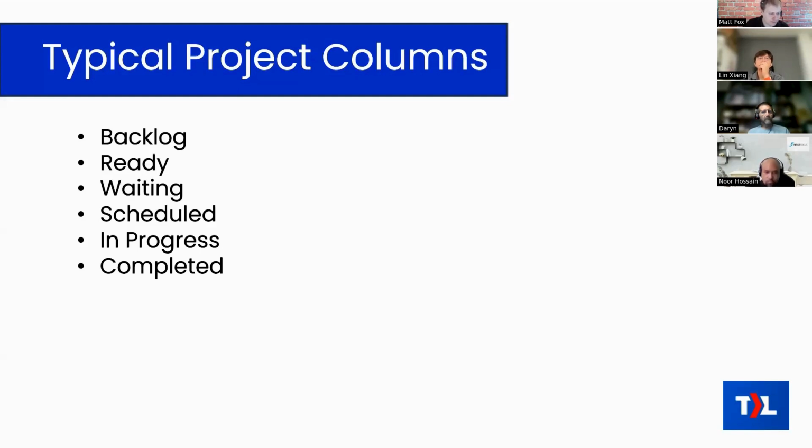The next step is for the project manager to recognize, okay, we're getting to the stage where some of these tickets that are in the backlog are getting ready to be done fairly soon. So I'm going to move them over into the ready column, and I'm going to start doing my work on those, which would be making sure that they've got a good scope and setting a budget on them if that's not already done, and then getting them assigned to somebody, which I'll talk about shortly.